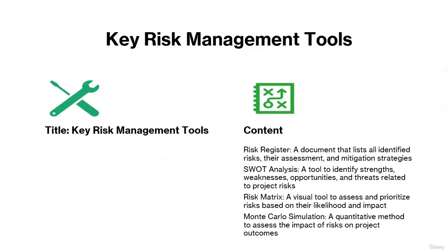Let's discuss key risk management tools. To manage risk effectively, you will need the right tools. Some key risk management tools include the risk register, a document that lists all identified risks along with their assessment and mitigation strategies. It is a living document that you will update throughout the project.